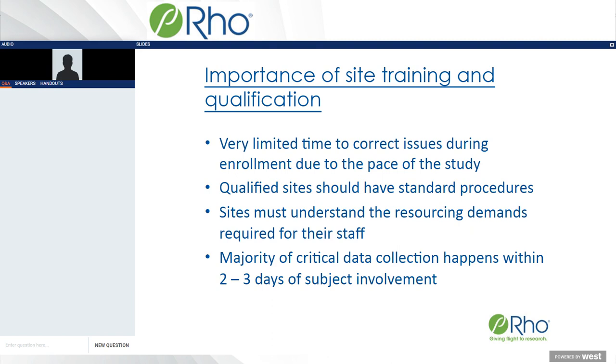In terms of the resourcing demands at the site, recommend asking them to provide you with a resourcing plan. It's important that they understand the demands on their resourcing and on their staff. There are frequently rapid data entry expectations. We need to see that data quickly. Overnight visits could be a possibility, assessments occurring overnight, randomization at 3 o'clock in the morning, for example. So we want to ensure that the site has adequate resources in place and that they fully understand the demands